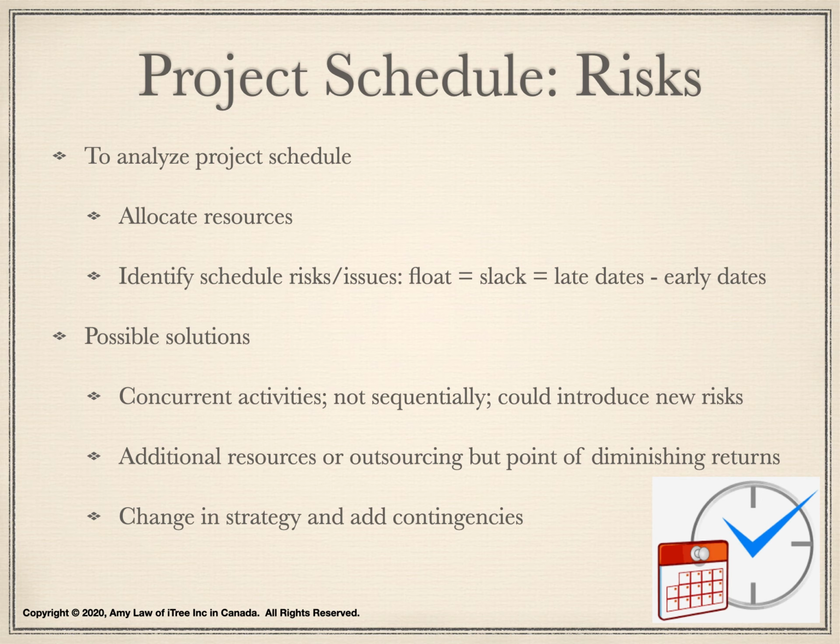To address schedule risk and issue, we can consider concurrent activities. As such, the project is not executed sequentially. However, this could introduce new challenges, such as managing team communication to understand how activities would be executed in parallel, balancing the workload, and implementing the parallel activities correctly.